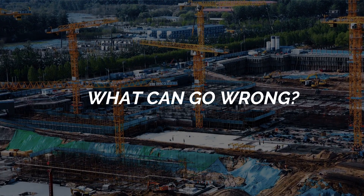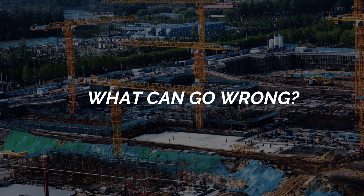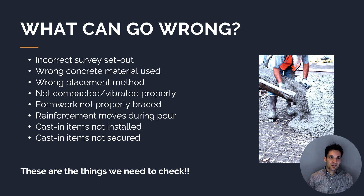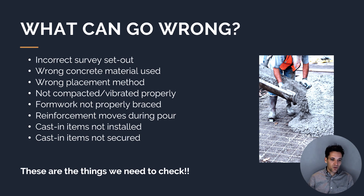You want to create a big list of everything that could possibly go wrong for that specific construction activity, and then check that you're not going to make those mistakes. For example, with concrete works: you could incorrectly set out the survey, use the wrong concrete material, use the wrong placement method, fail to compact or vibrate the concrete properly causing air pockets, use the wrong type of formwork or have it incorrectly braced, have reinforcement move during the pour, miss installing service penetrations, or miss installing cast-in items like bolts.